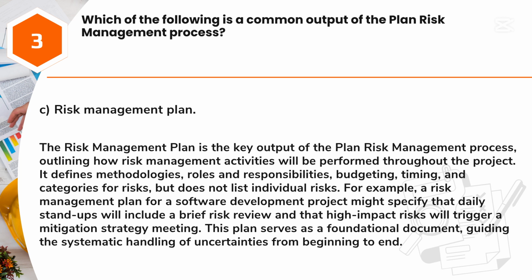For example, a risk management plan for a software development project might specify that daily stand-ups will include a brief risk review and that high-impact risks will trigger a mitigation strategy meeting. This plan serves as a foundational document, guiding the systematic handling of uncertainties from beginning to end.